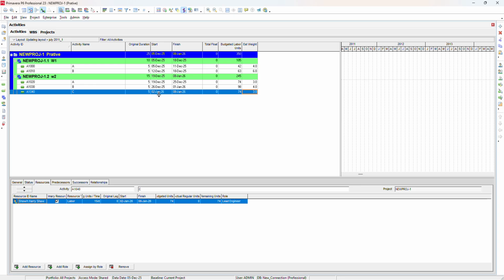So based on this top-down estimation, you can find how many budgeted labor units can be used for the project. Like if you are confident that 30% of resource should be used for the one WBS level, then you can estimate. This process will be very useful to estimate the top-down budget for the project. So it will be helpful if you know the estimation weight or weightage on each work package, then you can do it this way.